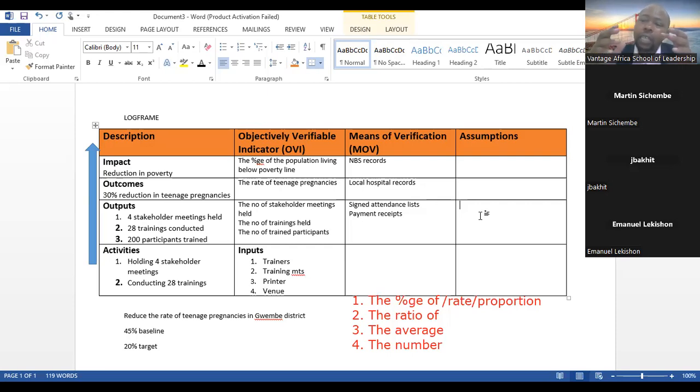Yes. Great. Now, it is important for the donor to know that it is a possibility. And by the way, you can only put it as an assumption if it is a real possibility of occurring. I will try to explain the difference between an assumption and a risk, and why we call it an assumption and not a risk. If it is in the negative, it's a risk. If it is in the positive, it's an assumption.